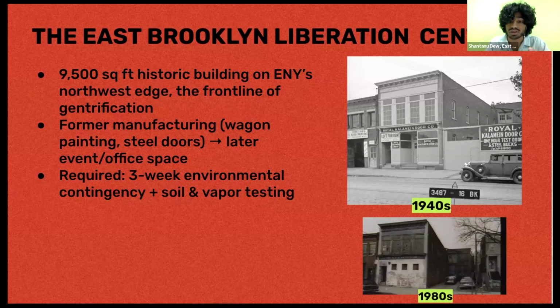This is important because if there is potential remediation, we didn't want to enter a contract for the building and then be faced with the financial and labor burden, or have the city and taxpayer be overly burdened with the cost of this remediation work. So this contingency gives the space to negotiate with the seller, and in the end to make sure the building stays long-term, reducing costs on the building, whether through acquisition costs or the rehab costs, but making sure also that the property will stay safe as a community space, expecting hundreds, thousands of folks to come in, protecting all the future occupants long-term.